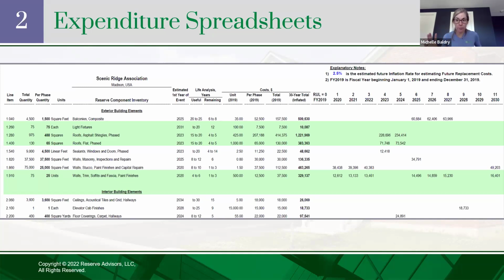As I mentioned, not a crystal ball. So it might be that they needed to replace the balconies in 2024, or maybe they're still in great condition. We're entering into 2025, we had them evaluated, and they're still holding up just fine. We're going to defer that project out to 2026 and reevaluate it to maybe consider starting the project in 2026.